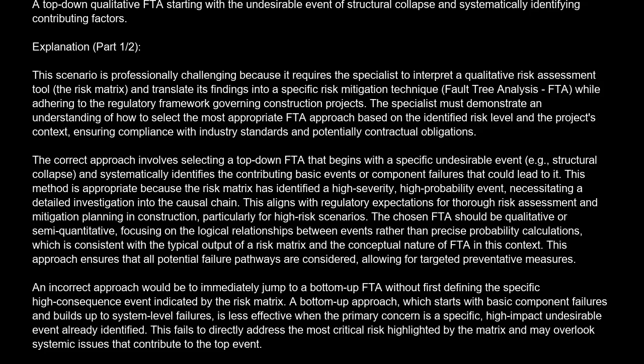The correct answer is B. A top-down qualitative FTA starting with the undesirable event of structural collapse and systematically identifying contributing factors. Explanation. This scenario is professionally challenging because it requires the specialist to interpret a qualitative risk assessment tool, the risk